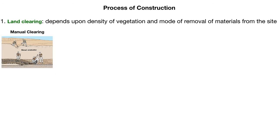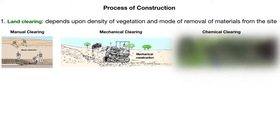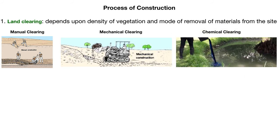The second method is mechanical clearing. If the density of vegetation is thick and complex — with big boulders, deep-rooted trees, lots of undulations, and big ditches — then mechanical equipment like scrapers, bulldozers, or other earth-moving equipment are engaged to clear the site. The third method is chemical clearing: if the soil contains harmful bacteria or microorganisms harmful to aquatic animals, chemicals are mixed into the soil to kill these harmful bacteria.